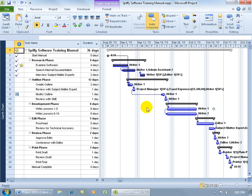So splitting a task, you can split anything, but rescheduling a task using that feature only works on those tasks that have already started but haven't been completed yet.